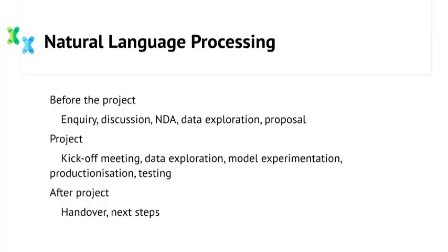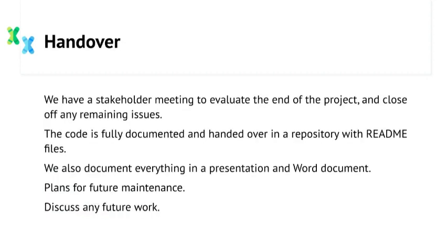Finally, we will have a stakeholder meeting to hand over the project. The code should be fully documented and in a repository, and the client will be given control of that repository. I also make sure that everything is documented in a presentation and Word document, and I personally present everything to the clients and ensure that their technical staff are on board and are aware of how the solution works, and we can come to an agreement about any ongoing maintenance.